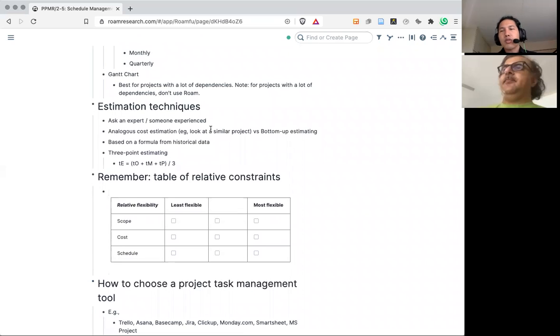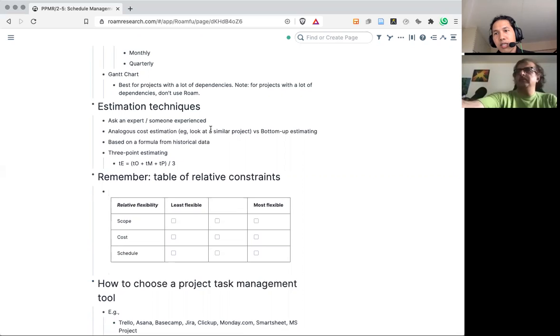So also, if you do a lot of projects of the same type, you could estimate the time it takes for those projects based on some sort of factor in the project. For instance, in construction, I imagine these experienced contractors could estimate the completion of a construction based on maybe floor area or type of building or something like that. So I guess, yeah.